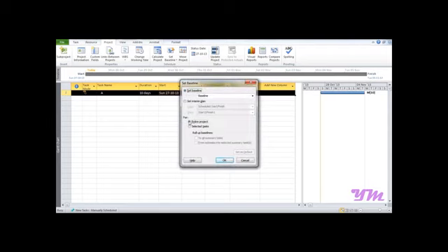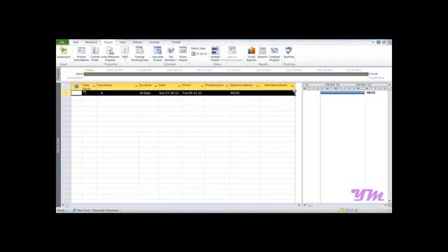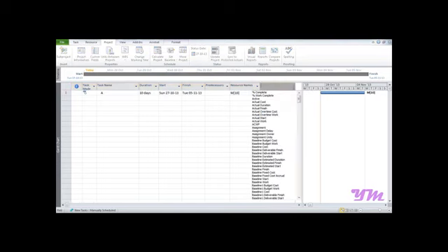Make sure that you have selected entire project over here and click on OK. Now go on to the add new column and select baseline cost. So the cost of the project for the 10-day comes out to be 40,000, as we already know.